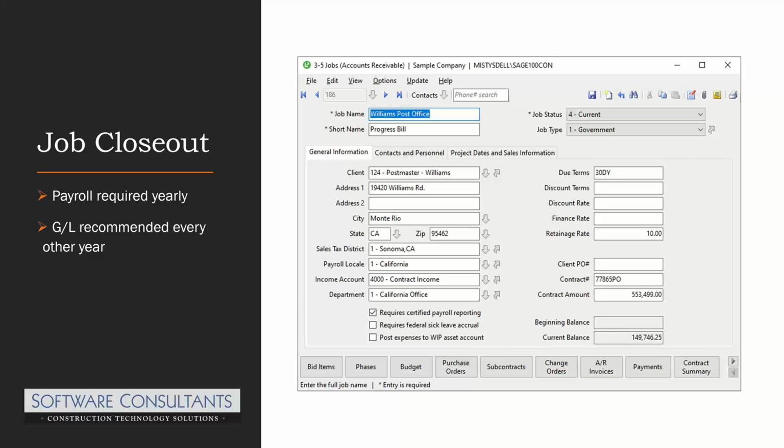I also used the cost to complete when I was in industry for billing purposes. So, your schedule of values could match your budget. It would match your dollar amount for your budget, because again, those are budgeted items, not selling amounts. But you could easily use that functionality within the cost to complete to get the billing ideas.